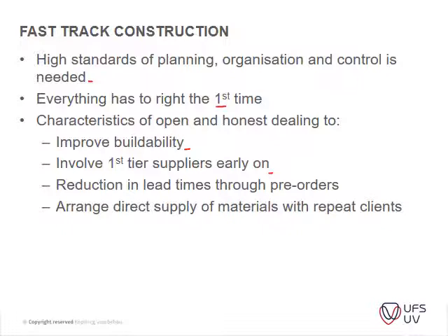Reduction in lead times through pre-orders is very important. Arrange direct supply of materials with repeat clients. Okay, clients who actually know what you want. You don't have to get samples and so on beforehand, for instance, but you've got a relationship with these suppliers.